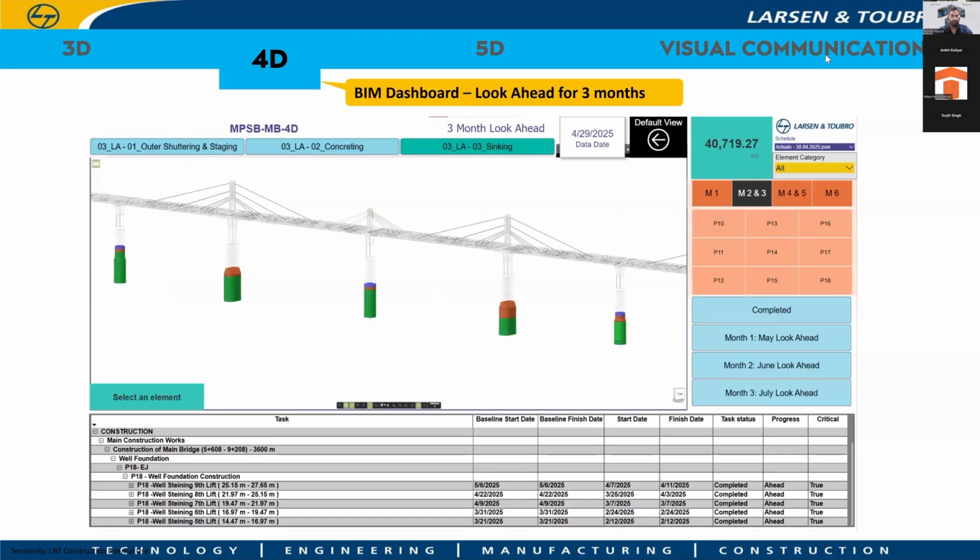As I mentioned before, it also gives insights from the look ahead plan, to plan my logistics and understand constructability issues. I can sense all these things in advance by running the look ahead plan, which gives the complete detail of your activity for the next 3 months, or 30 days, 90 days, based on your requirement. It will give the output.